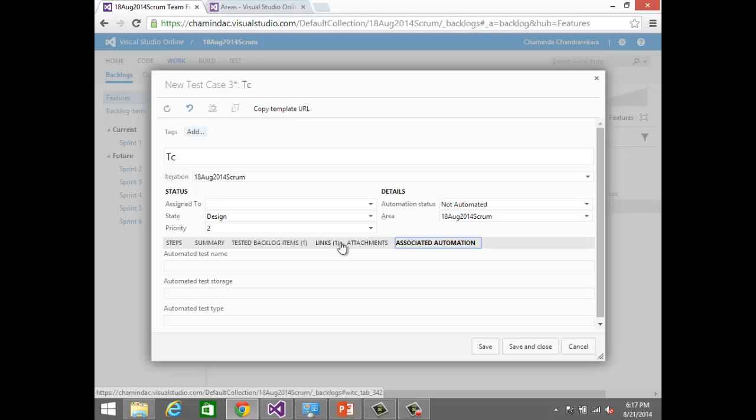The feature will be implemented using three things depending on the template or depending on the way you work. That is called requirements in CMMI practice. In Agile, you call it user story. If you are doing Scrum, you call it product backlog item. It's just terminology, but you talk about the same thing, right? A feature is implemented using a requirement. So a requirement has three names: requirement, PBI, and user story, right?